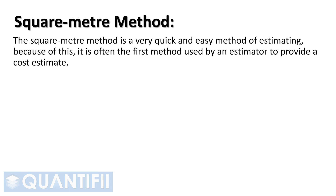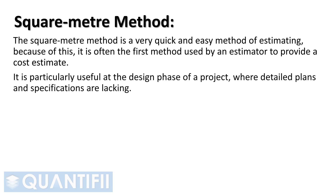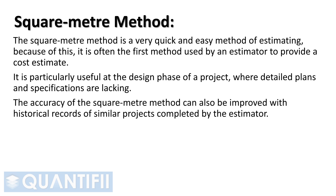It is particularly useful at the design phase of a project, where detailed plans and specifications are lacking. The accuracy of the square meter method can also be improved with historical records of similar projects completed by the estimator.